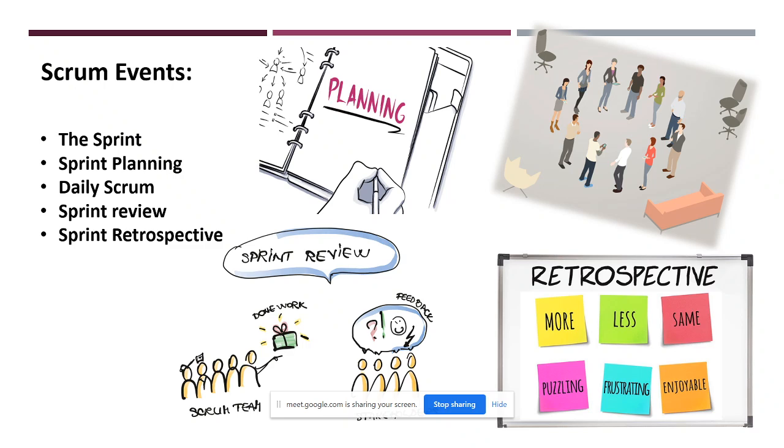Ideally, people will take 2 weeks for a sprint. So a sprint means a time frame of 2 weeks. Two weeks means 7 days plus 7 days, 14 days, but in a week we have 2 days holiday, Saturday and Sunday, so we have 5 working days. So a sprint means 10 working days. It's a 2 weeks time frame, whatever we are going to develop in that time frame. Hope you got what exactly a sprint is.